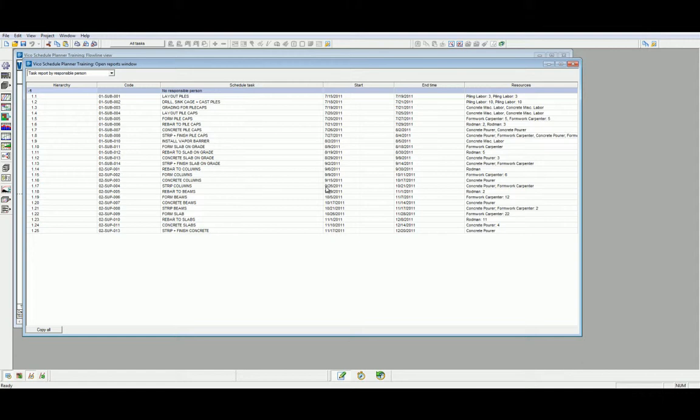The first report that is automatically loaded when we open our scheduling reports is the Task Report by Responsible Person. This default report highlights all the project tasks, their start and end dates and resource types. This enables us to quickly gauge whom the responsible party is for the project tasks.